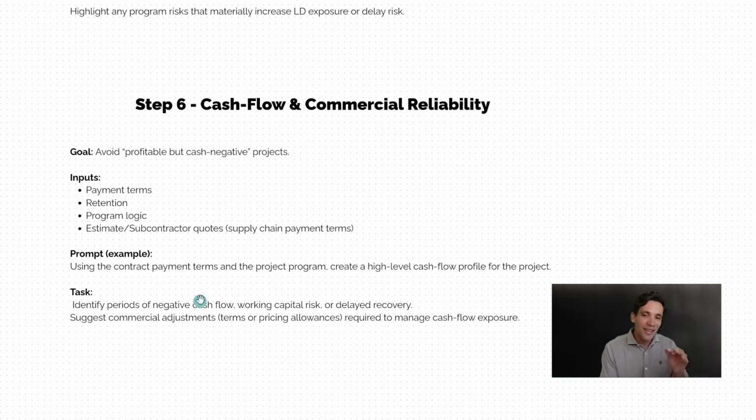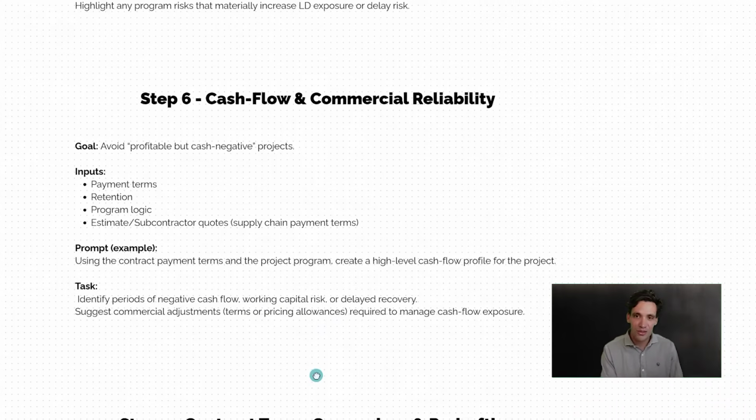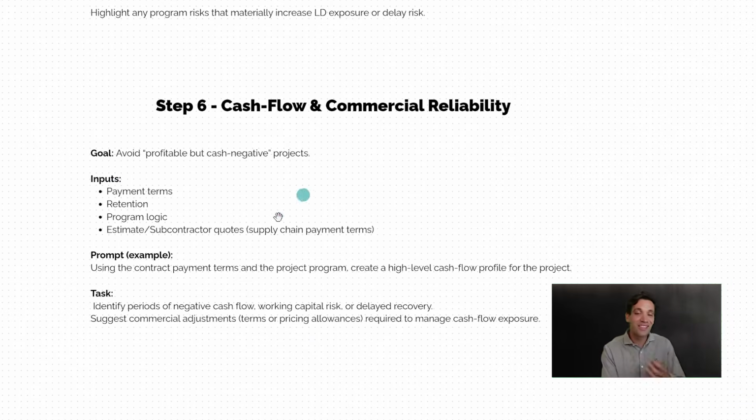This is going to help you identify how you can change the payment schedule, how you can play with the different payment terms to get it as close to cash neutral or ideally cash positive as possible. Again, you should be doing cash flow forecasts for your projects, but they're often quite confusing and hard to do. So this is just an easy way to play with the payment terms and understand what's actually driving the cash position.